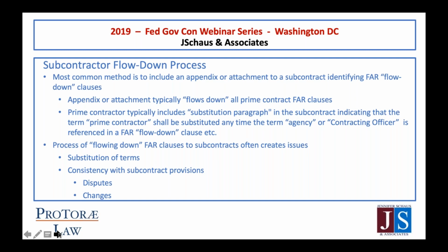And the subcontract may say, well, this has precedence over the other one. Well, that may make it clear, but that may not be the intention of the parties. It may be that they never intended that provision to trump the other provision, or they intended them to work together and not have one have supremacy over the other. So really the most important thing for a prime contractor is not to flow everything down, but to ensure that what it flows down really is consistent with what it intends the subcontractor to do and what's addressed in the subcontract itself. Next slide.